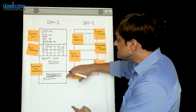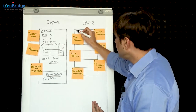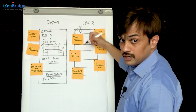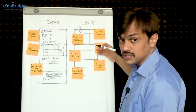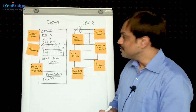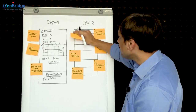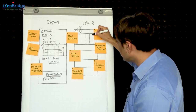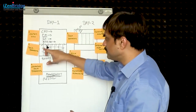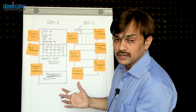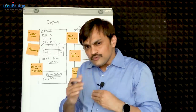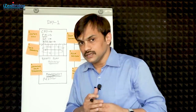Day two starts with those planning adjustments. It could be a change in priority, it could be de-scoping a particular feature to make it fit well in a particular timeline for a particular team, it could be moving one feature from one team to another team - all these options are open. When to apply what option depends upon the group reviewing and working together to come up with a workable PI plan. We do planning adjustments, and this is usually communicated led by the release train engineer, maybe some business owner, maybe product management - a group of people may end up doing this job. Once the planning adjustments are communicated, we have team breakout rooms again.